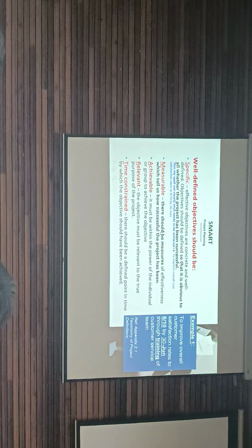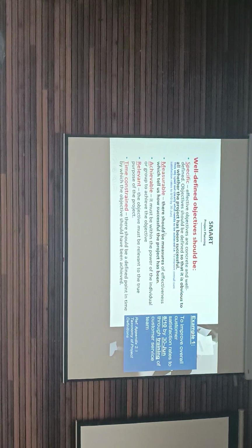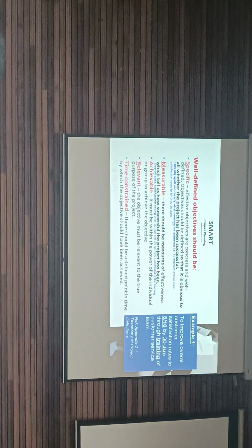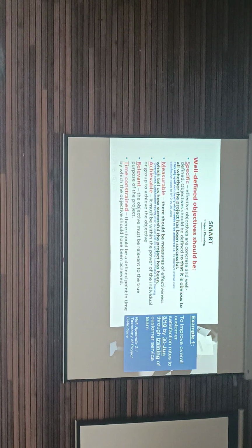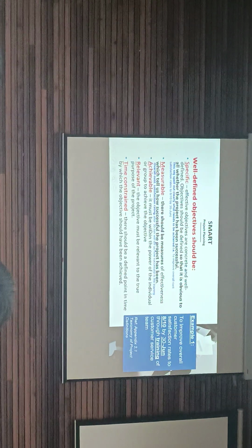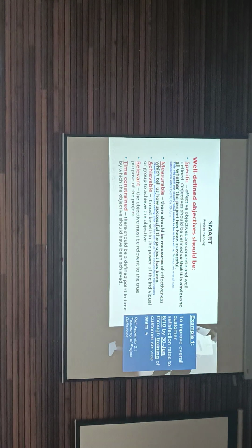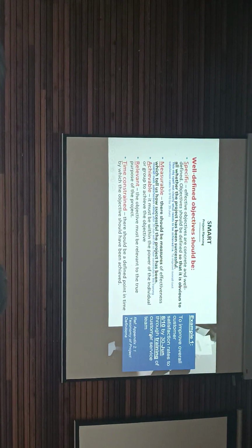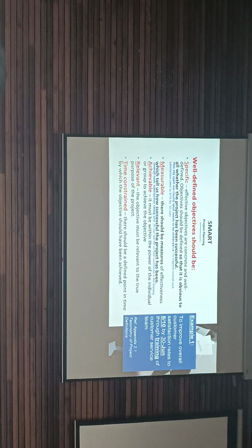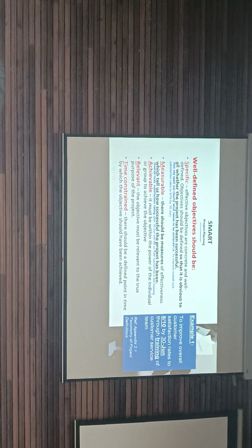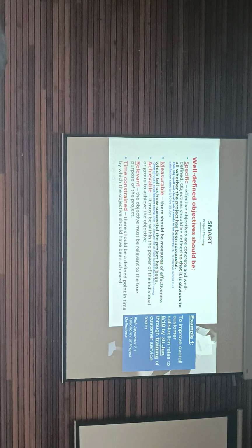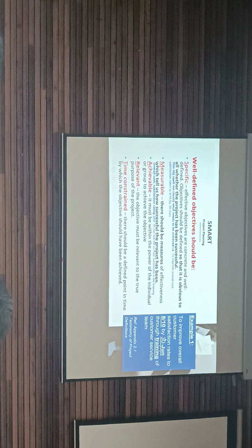Measurable: there should be a measure which tells us how successful the project has been. Overall customer rating after 30 June will tell us how successful the training is. If after 30 June you measure the customer satisfaction rate and the measurement gives you 8/10, is the training successful? Yes, the training is successful if you achieve 8/10.